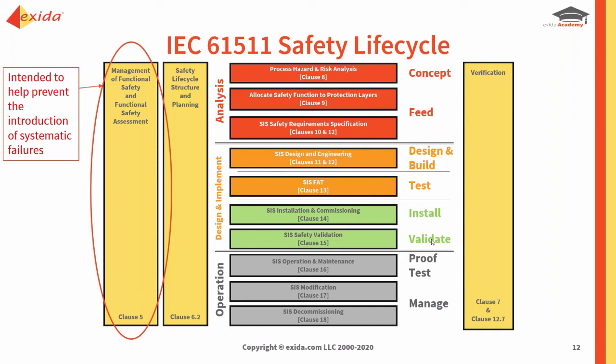And when you get to here to do the FSA 3, if you fail the FSA 3, then it can be quite costly because it will delay startup. Or if the end user chooses to start up, then they're assuming a higher level of risk. And the other thing you need to do is make sure you check with your insurance company if you're not self-insured to see that you're covered if you haven't passed an FSA 3 and you choose to start up.